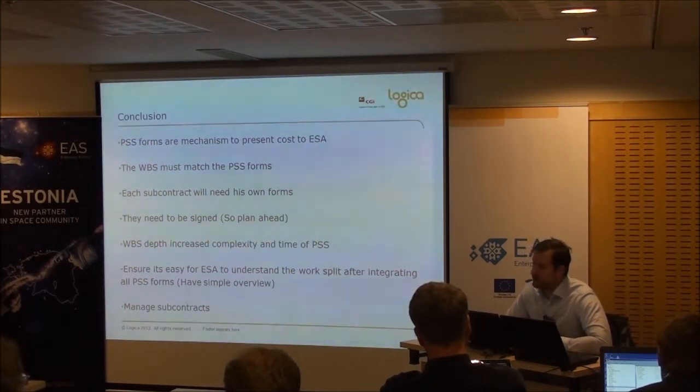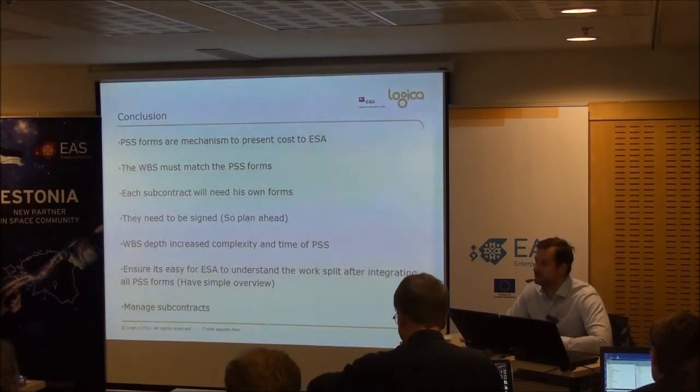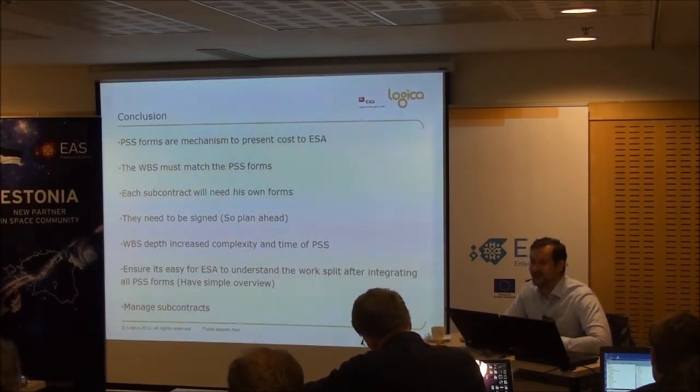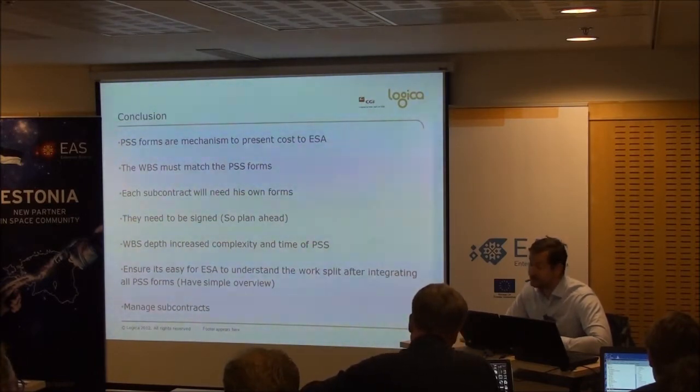The more you break down the WBS, the more you add to what they're asking for, the more complexity you'll create for yourself. I'm not saying don't do it, I'm saying be wise about it. Don't just think it's a great idea to have 200 work packages, because you'll be creating a sting in the tail later, which is much harder to fix, particularly if you've issued those to subcontractors. Then you've created a problem that's very hard to solve. And the closer you are to the deadline, the harder that's going to be to do.